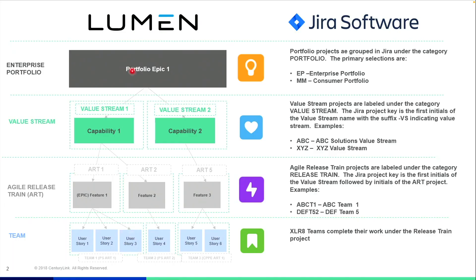A child to that is the capability. The portfolio epic has then been decomposed into capabilities that will be delivered over one or multiple PIs. Knowing that a PI is about 90 days, the portfolio epic is decomposed down into multiple capabilities. These are delivered at the value stream level.